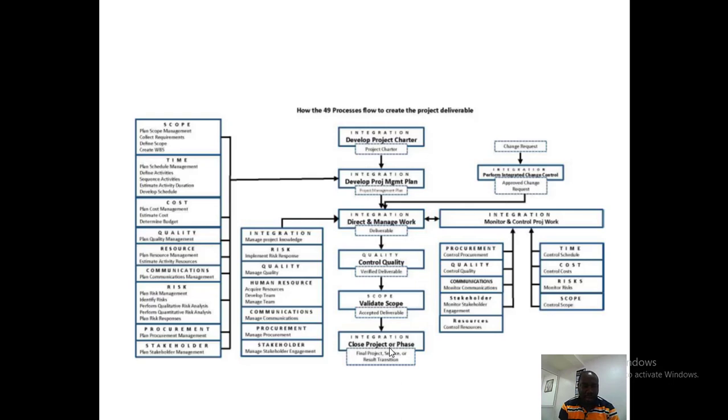And you look at the risk. You have to identify risk. Is there going to be a change in weather? Is there going to be any obstruction? Do I need to do some things so that will not disturb me during this time? You have to quantify your risk, and also if anything happens, you have to have a plan in place. How do I get it done? All right, for instance, when we are painting and this paint can spill, the paint can fall on the floor, probably you need to get something to cover the floor so that the stain does not smear the floor.